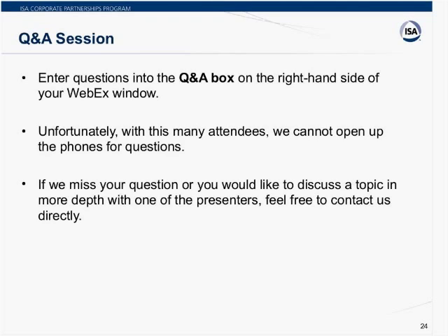Charlie, any comments on that? No, I would agree. I think we see FEL2 being, say, 50% to 70% of the total FEL budget. And as you pointed out, it depends on the number of platforms being evaluated. But FEL2 is a pretty heavy engagement period, between platform and technology selection. This is where you make the first pass at a really detailed TIC and TCO estimate. And it's where you fully quantify and capture the technical requirements for the given project and then evaluate each of the platforms against it. So it's a big chunk of work, and multi-platform consideration is going to push you closer to that 70%. But if it's light, it could be split evenly. Yeah, I agree.